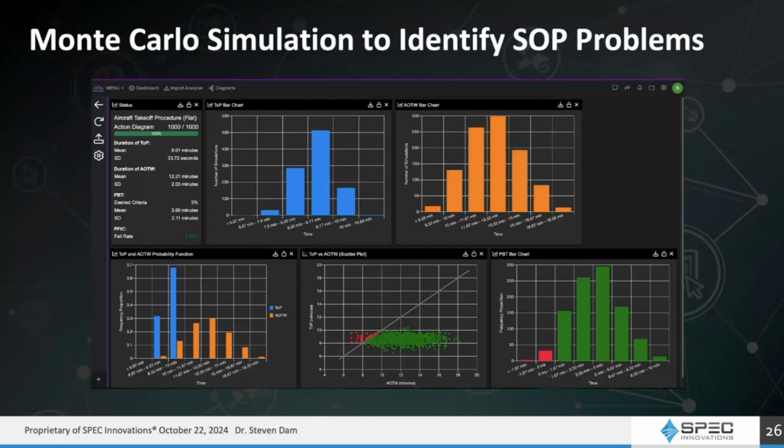Probably one of the most important things is that panel I skipped over at the very front, the status panel. That shows me my means and my standard deviations for each of the items. And there's an input of a criteria level. So if I can accept that 5% of the time it doesn't work exactly, that's what that number is.